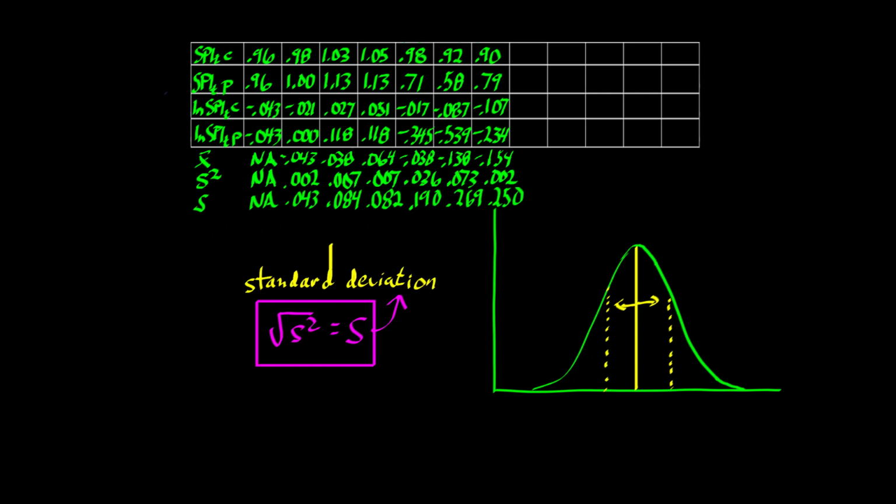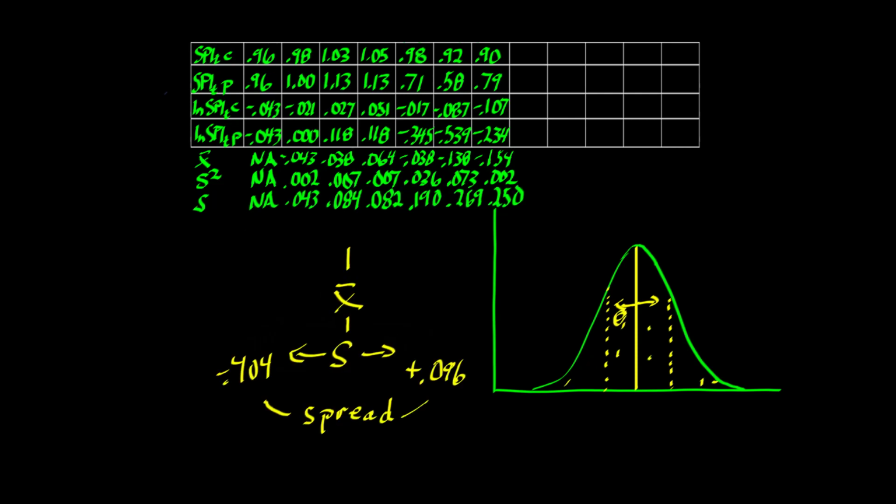From the mean and the standard deviation, calculate the spread of values. Is that spread the range of plausible bounds? No, that's the average dispersion around the mean. To know plausible bounds, we need a better idea of the distribution of measurements under the curve.